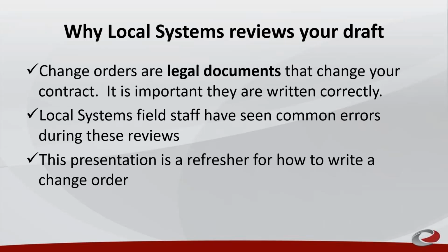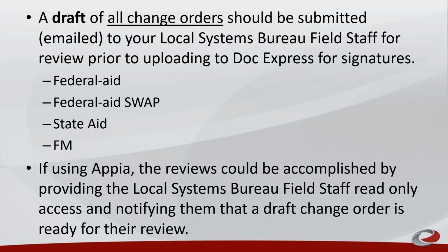Change orders are a legal document that change the contract. It is very important they are written correctly. Local Systems field staff have seen common errors during these reviews. This presentation is a refresher on how to write a change order. A draft copy of the change order should be submitted to the Local Systems field staff for review prior to uploading it to DocExpress. Change orders in Appia can be reviewed in the system, providing you have given the Local Systems staff read-only access.